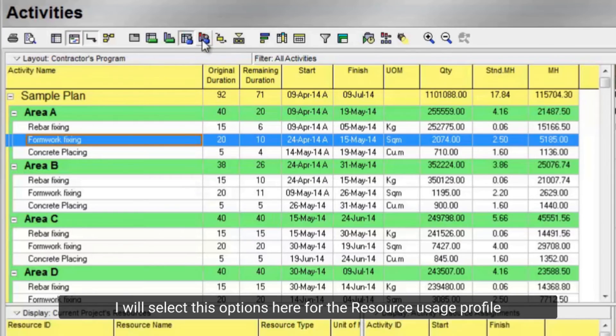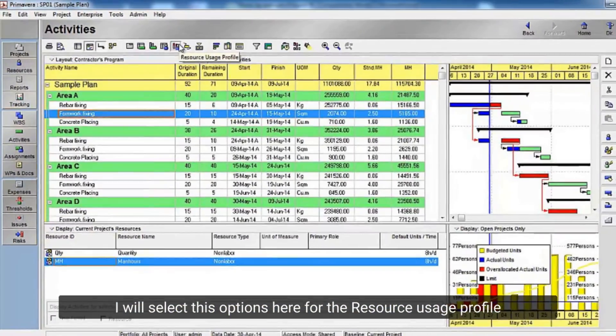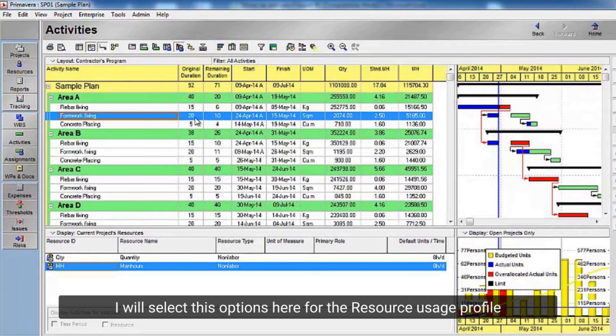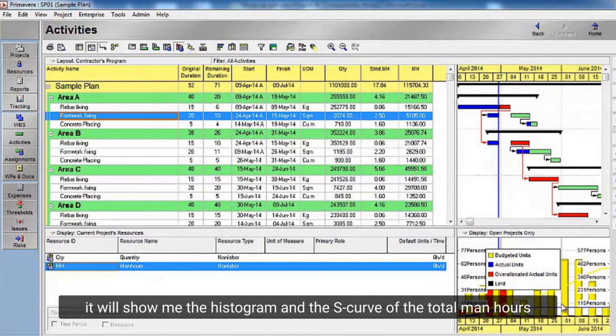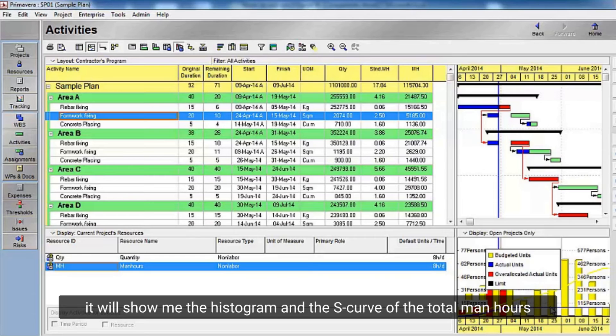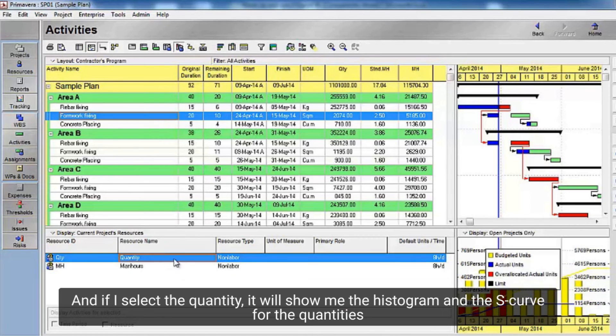I will select these options here for the resource usage profile. And at the end, if I select the man hours, it will show me the histogram and the S-curve of the total man hours. And if I select the quantity, it will show me the histogram and the S-curve for the quantities.